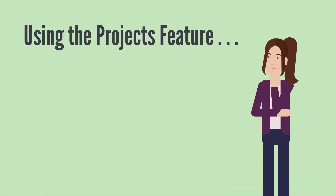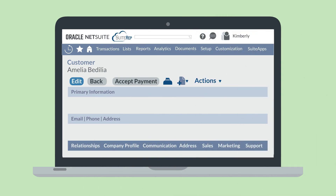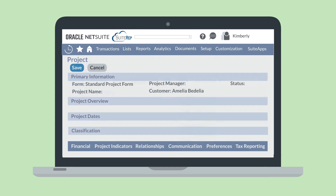What does using the NetSuite Projects feature look like in practice? The first step in using this feature is to create project records. With only the basic Projects feature enabled, you will need to create a project record directly from a customer record. On a customer record, access the Create New drop-down list and select Project from the list. Doing this will open up a new project record that is auto-filled with the customer's name and things like the subsidiary and primary currency that are associated with that customer.